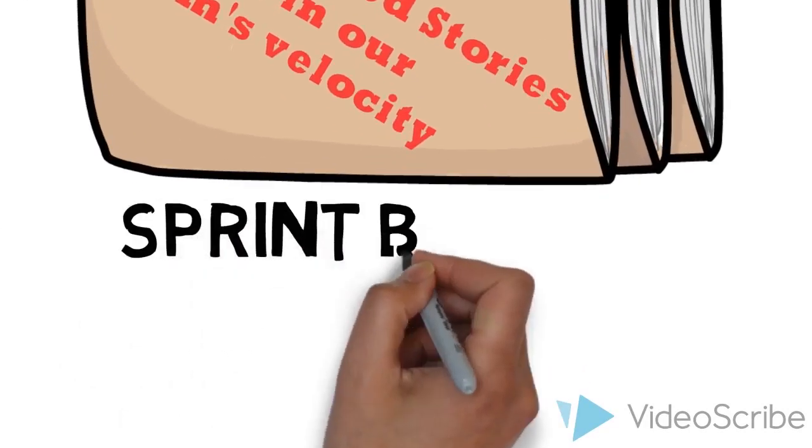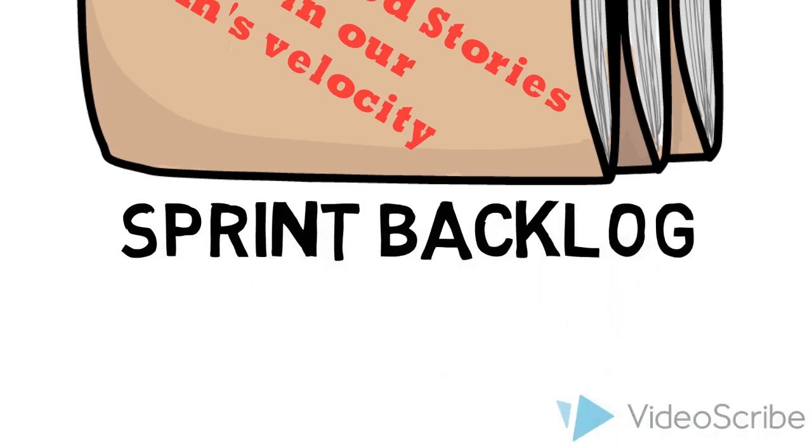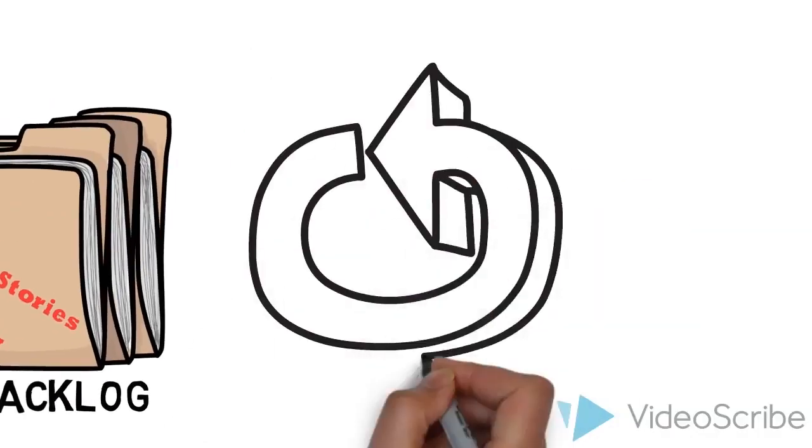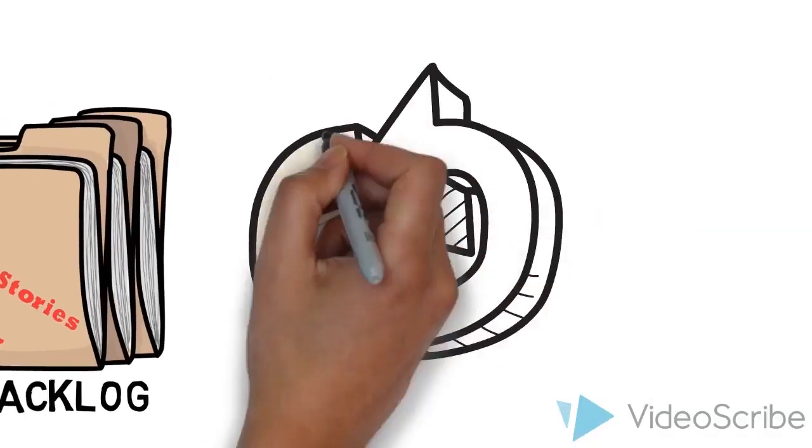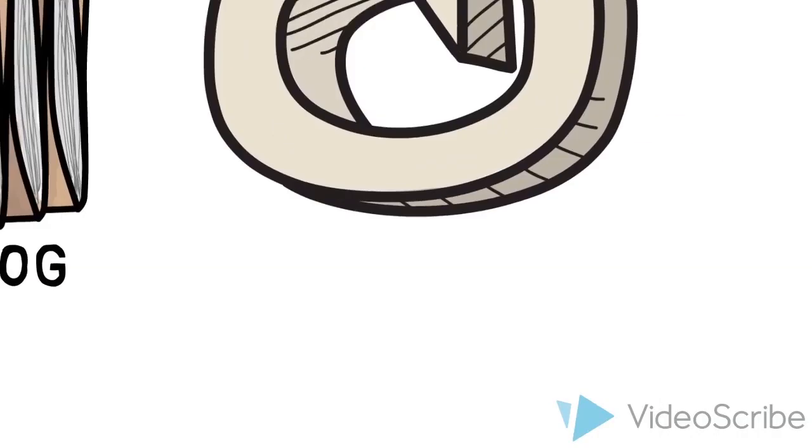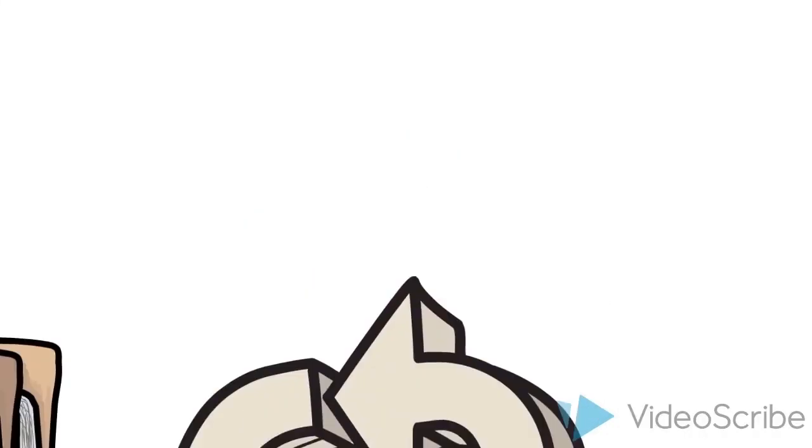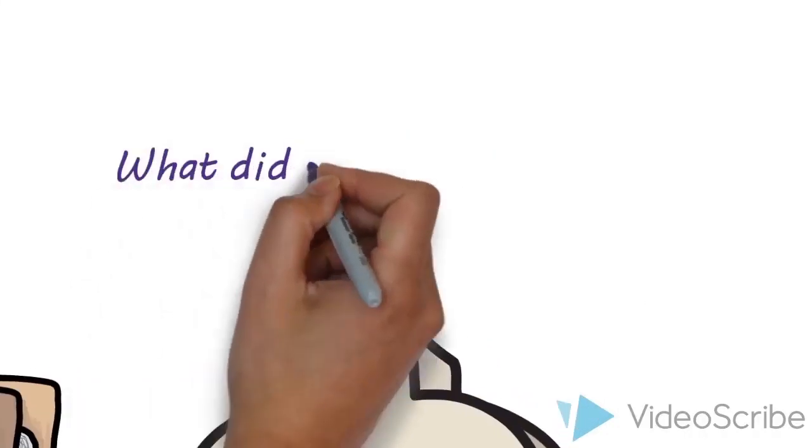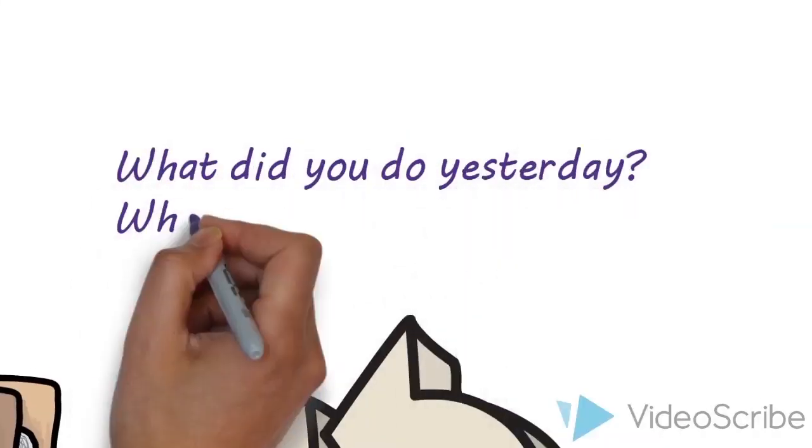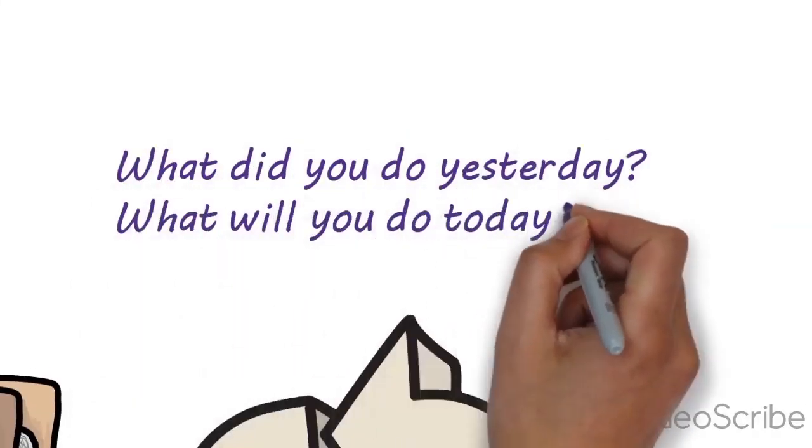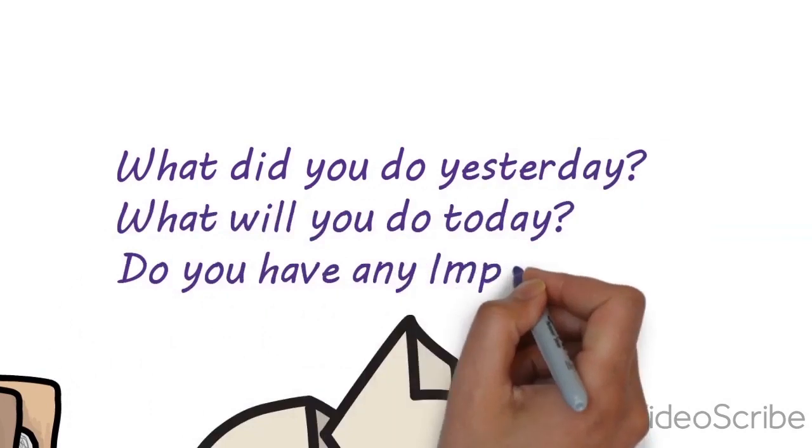Then we have a daily stand-up where we ask three questions: What did you do yesterday? What are you going to do today? And do you have any impediments?